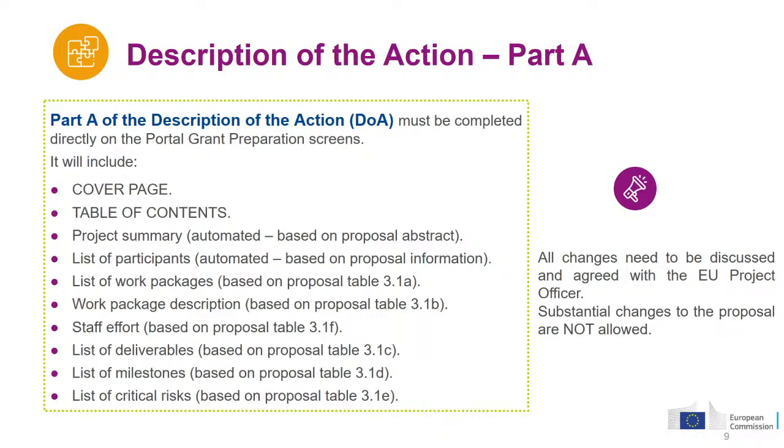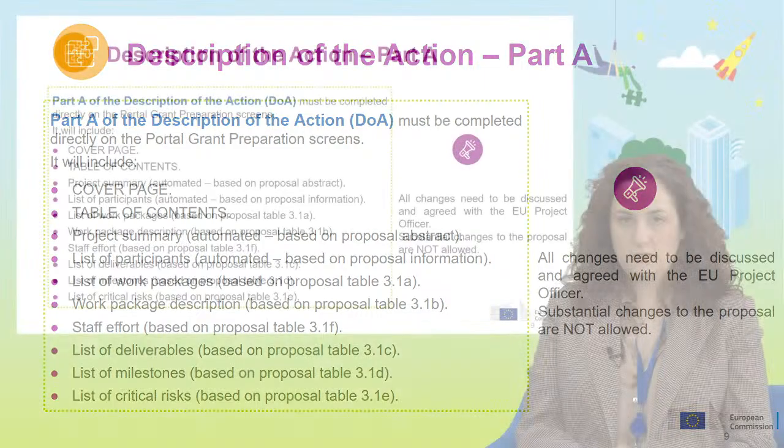And the second thing to point out is that if you need to do any kind of changes compared to the submitted version of your proposal, you should first discuss and agree them with your project officer in advance. And of course, we cannot accept any kind of changes that will substantially change the nature of the project. If they had been known in advance, they could have ended up in a different evaluation.